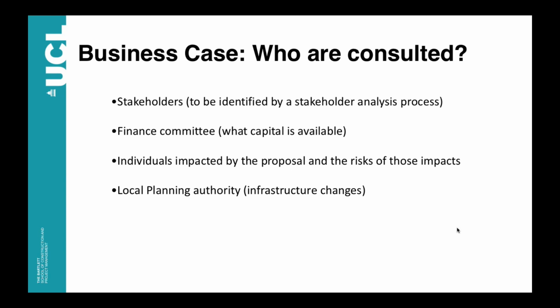The finance committee would be a very important body to consider because it is who manages the capital and who will advise about which capital is available. Also, we need to consider the individuals that will be impacted by the proposal and also by the risk associated with the proposal. And finally, we will have to take into consideration the local planning authorities, particularly in infrastructure and buildings.